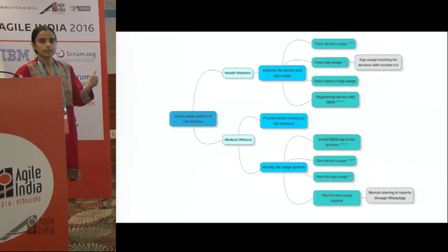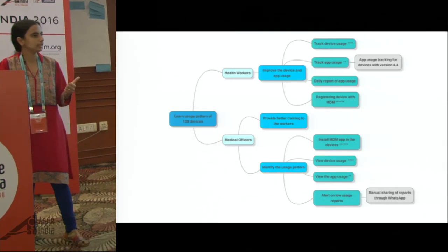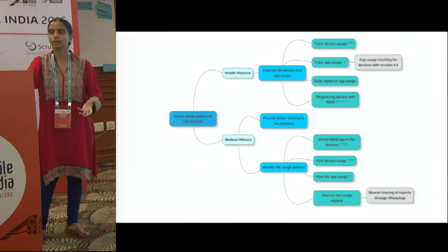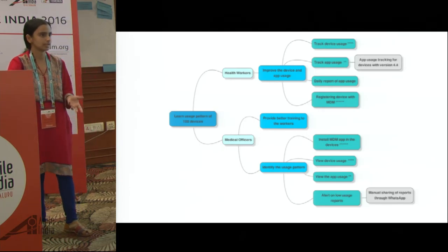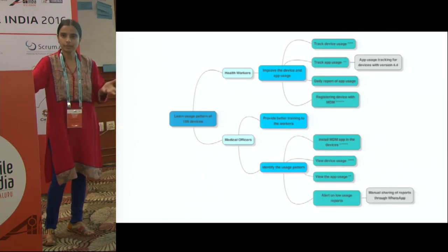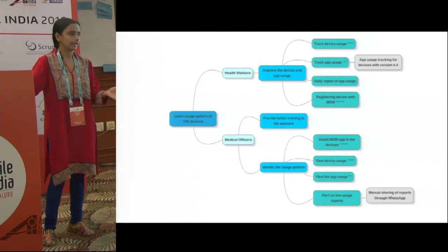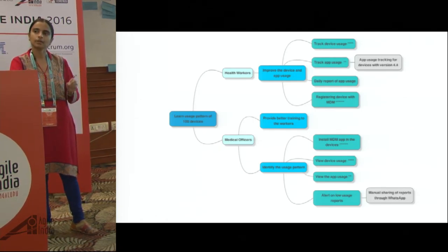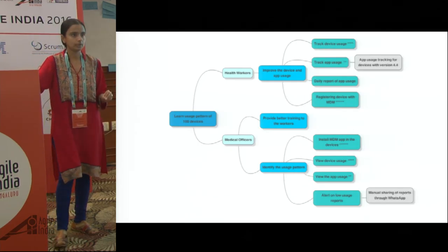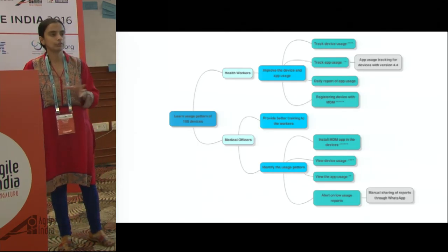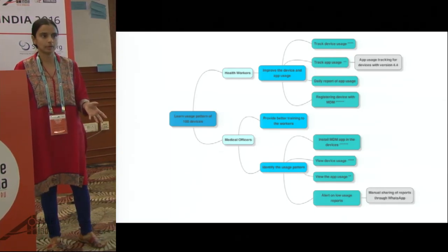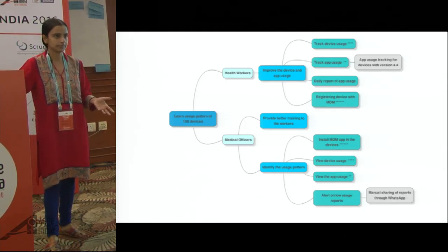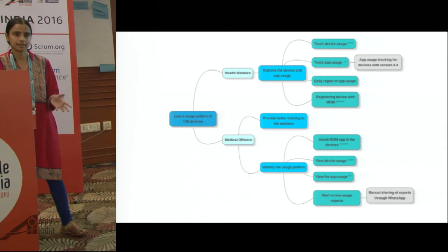With this exercise, we came to two things. We didn't come up with any prototypes because we realized that it will be hard for us to actually test it. We want to install it on the device and test it. So there is no other way to test it other than deploying the software. But one decision we could make is that we don't have to support all the Android devices, because all of them are using a specific device and most of them are running a very old version of Android. So the diversity or fragmentation of Android, we don't have to worry about it over here, at least in the initial stages, for the 100 devices at least, because the idea is to learn faster, and whatever we need to do to learn faster, that's more than sufficient.